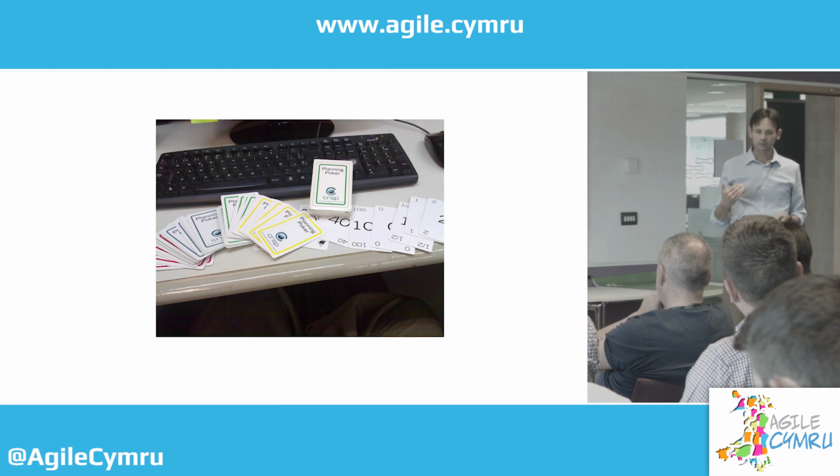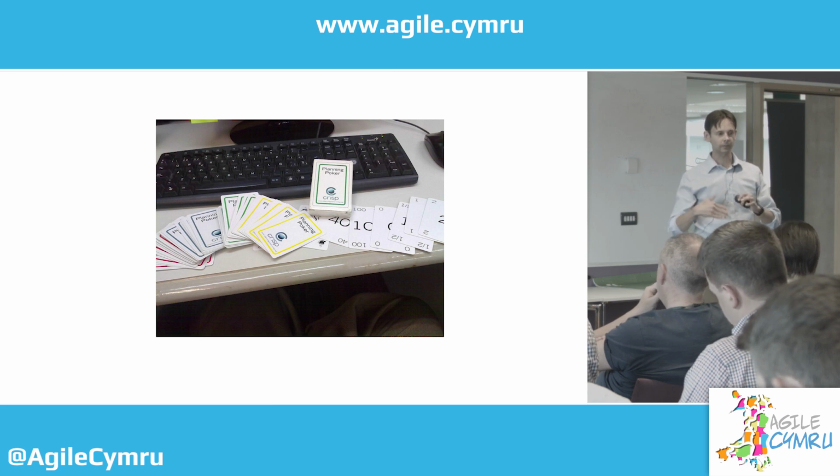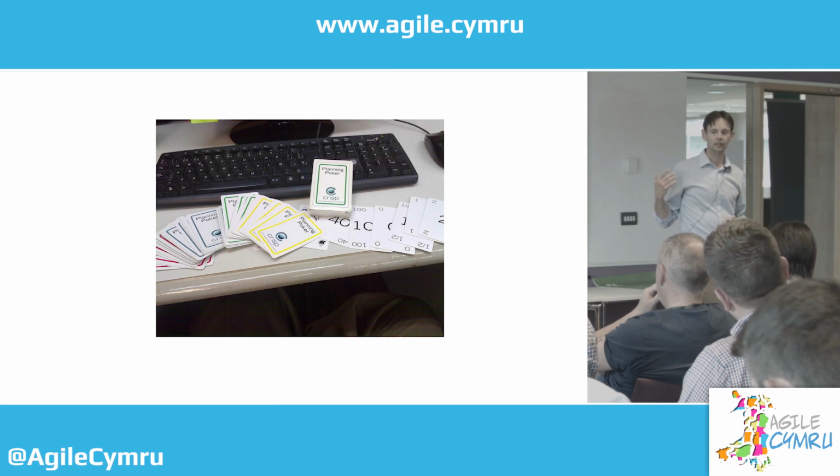So in planning poker then, we deliberately hide what we're going to say if we're estimating, and let's not go into no estimate stuff as yet. So we deliberately hide what we're going to say to avoid anchoring, to avoid groupthink. And it's another part of the Agile recipe that we need to be mindful of.